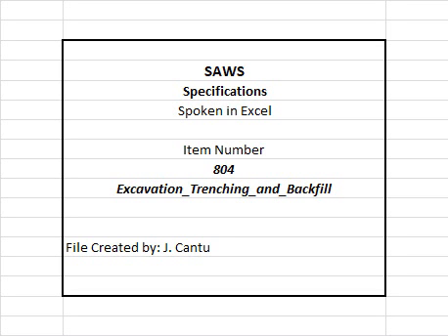The pavement, asphalt, section shall have 95% compaction density with a maximum dry density at plus or minus 1% optimum moisture content as determined by tests on samples as outlined in the latest provisions of TXDOT testing method TEX 113E or TEX 114, unless otherwise shown on the contract documents. At the time of compaction, the water content shall be at optimum moisture content, plus or minus 1% points as outlined in the latest provisions of TXDOT testing method TEX 113E or TEX 114.